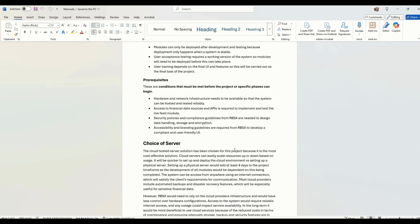So that's going to be carried out as the final task of the project. A prerequisite is a condition that must be met before the project or a specific phase can begin. For example, hardware and network infrastructure needs to be available so that the system can be hosted and tested reliably. So Marius basically needs to do his job first.